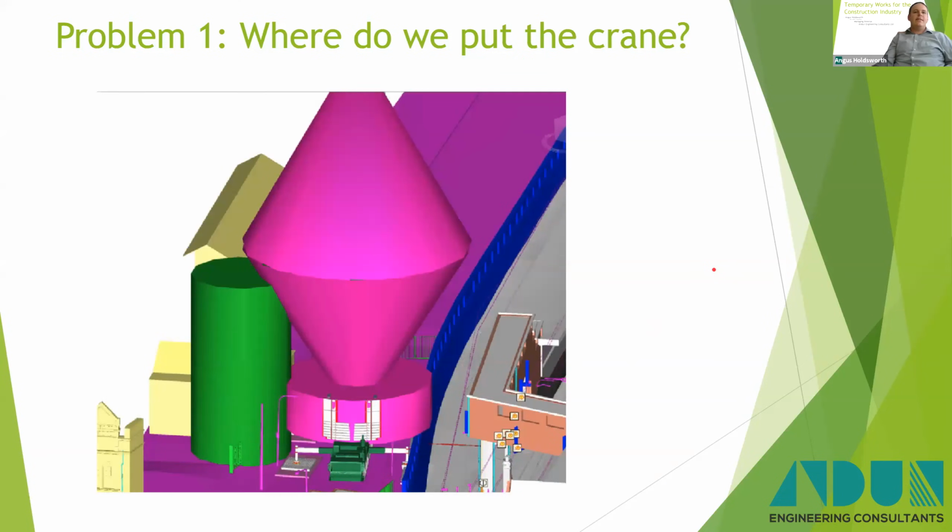I said it was tight. This is a 3D model we used. So that purple cone there shows you the outrigger swept path, as it were, and then the backstay swept path is in that cone there. So this lamppost was very, very close. There's also that cone there which represents the tree. The counterweights actually went underneath it. You can't see there how close it was to the buildings as well, but when I say only just fit, I mean only just fit.